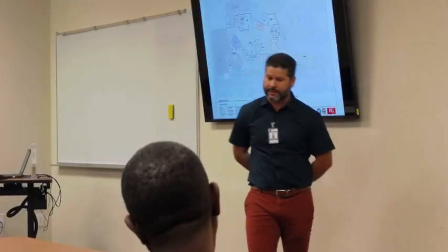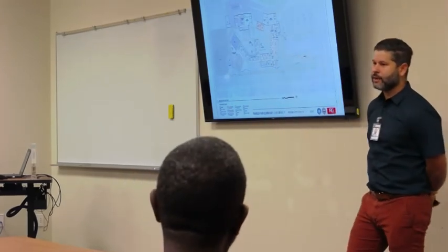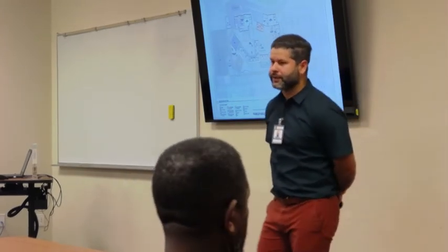But what about flood elevation, is that gonna impact it? That goes up 3 feet. It's a 100-year event, so that's gonna affect the existing building. That is a challenge, and that's one of the reasons why the consulting team included removing these buildings, because obviously if this is higher, how do we connect to that? It created a challenge, but the DOE was very adamant that the building did not meet the requirements: 3 feet, a 36 inch requirement, two feet above the 100-year level. A ramp.